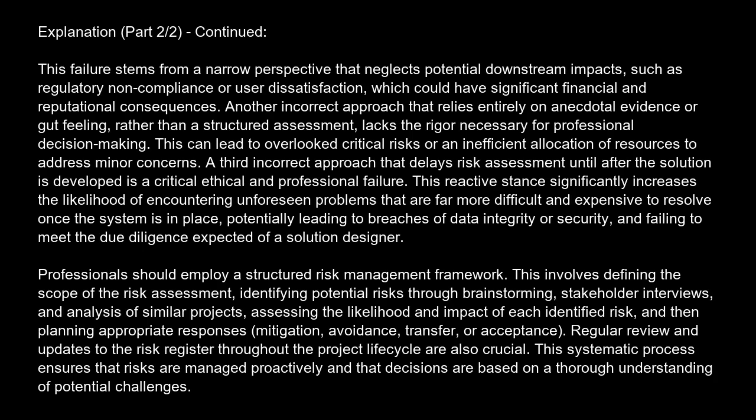Professionals should employ a structured risk management framework. This involves defining the scope of the risk assessment, identifying potential risks through brainstorming, stakeholder interviews, and analysis of similar projects, assessing the likelihood and impact of each identified risk, and then planning appropriate responses: mitigation, avoidance, transfer, or acceptance. Regular review and updates to the risk register throughout the project lifecycle are also crucial. This systematic process ensures that risks are managed proactively and that decisions are based on a thorough understanding of potential challenges.